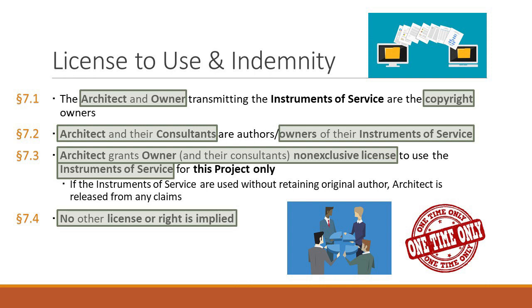7.4. In the event the owner uses the instruments and services without retaining the author of the instruments and services, so they build that second tower, and I don't hire the first architect, but I have the drawings, the owner releases the architect and the architect's consultants from all claims and causes of action arising from such uses.